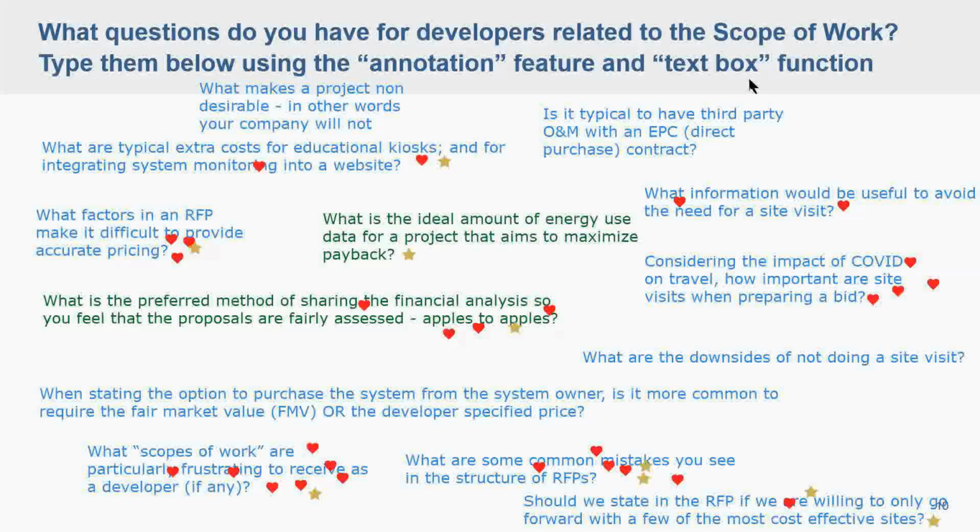I would say probably the two things that our team looks at first are, well, the first most important thing is if there are solar friendly incentives available, which would allow us to offer you all a lower PPA rate. In states where there are incentives available, we usually are keeping an eye on when incentives have filled up and have a good sense of what project might be too small, or if a carport is going to be too expensive to be able to offer anybody savings, and can kind of know off the top of our head that maybe a 500 kilowatt carport just is never going to be able to offer savings.